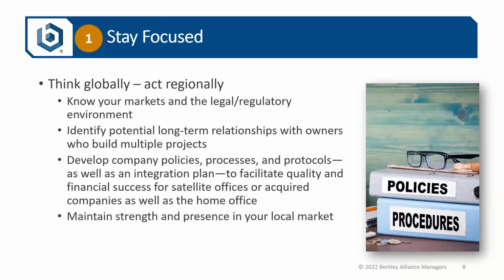Getting back to healthcare, consider the difference between Illinois, which I would consider to be a relatively easy state to work in, as compared to California, which has a very arduous process for getting healthcare projects approved. They have an organization called OSHPD, which has very stringent procedures and policies that add to the approval process in terms of time, planning, design, and construction costs. And the costs of projects are significantly higher than what we face in the Midwest. So again, the difference between legal and regulatory standards in a different state can be significant.